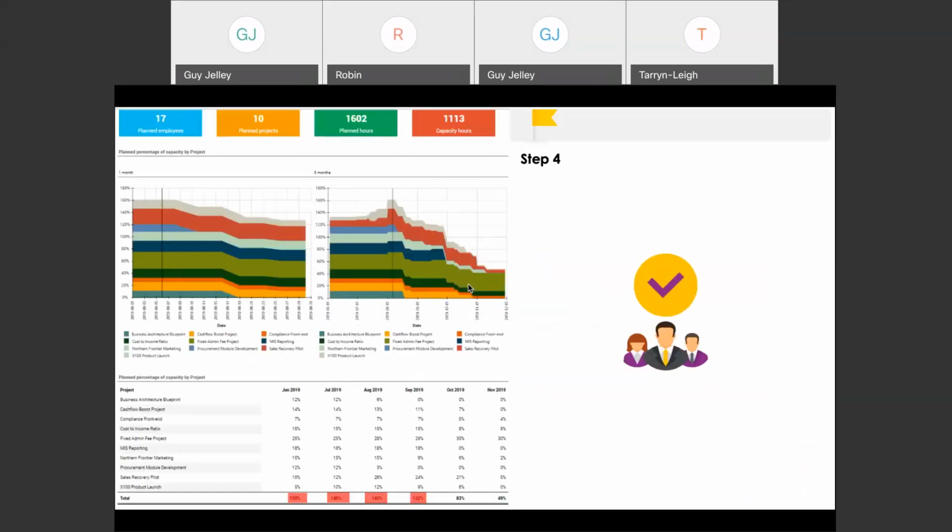This is another example of some of the outputs where you've stacked up per project, and you can see each project's color, and you start to get a view for what the capacity is. And what typically happens, as I said before, you can see it over there in the bottom. All the red blocks is where we run way over our capacity, 133%, 140%, 143%, and that's what's causing the pain. That's what's causing the delays. That's what's causing the dissatisfaction. That's what's causing the lack of agility and those type of things, because we've just overcapacitated them. If you haven't done resource management properly and you've just activated projects and thrown resources into it, this is the view that you're going to start to get.